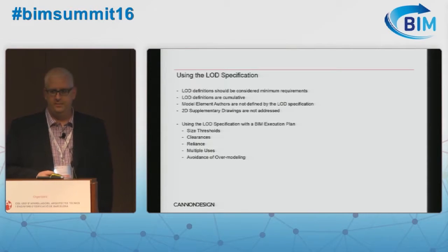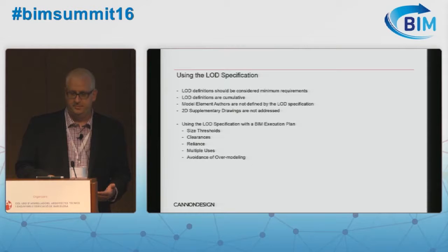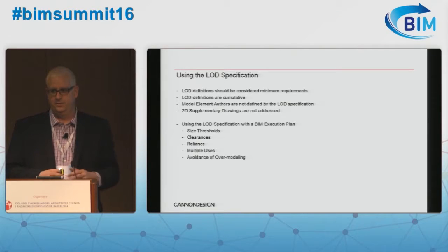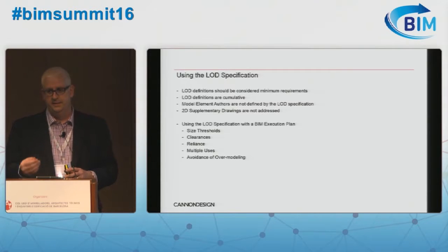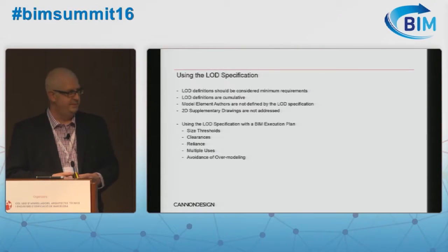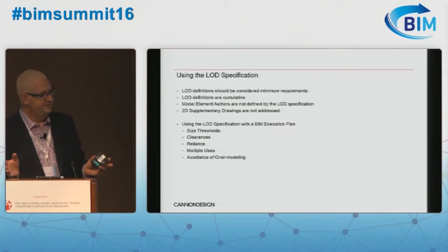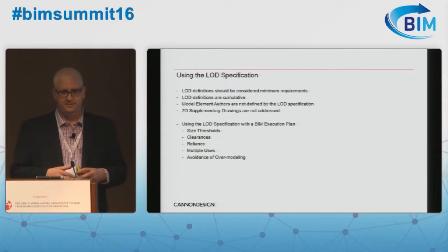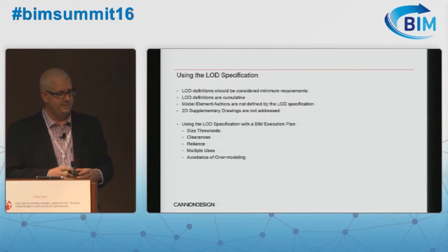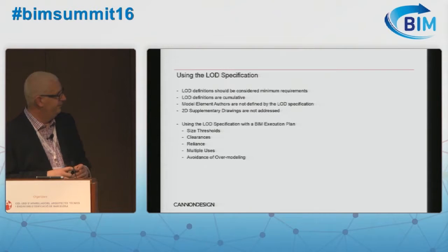We talked about model element authors. We do not make requirements to who is responsible for, say, a light fixture. Project team defines if that's the electrical engineer, the interior designer, or the architect who is responsible for that. Those responsibilities could change throughout the project, but it's the project team's goal or responsibility to define who owns that element, at what stage, and how far it is going to be developed. It also doesn't address 2D information. This is a level of development. It's a modeling guide, so line work is not part of that component.